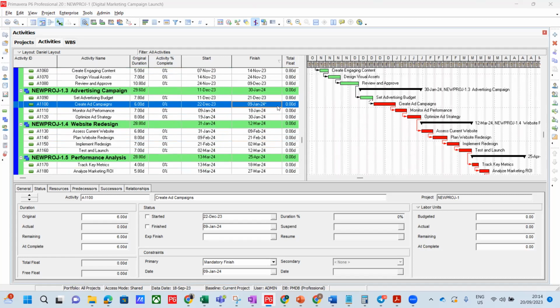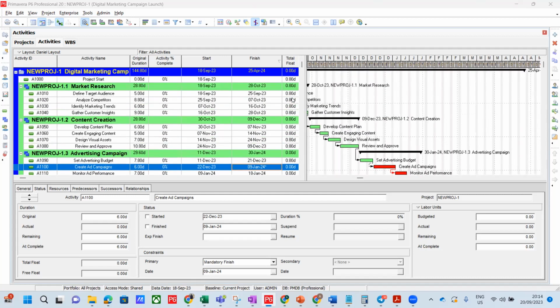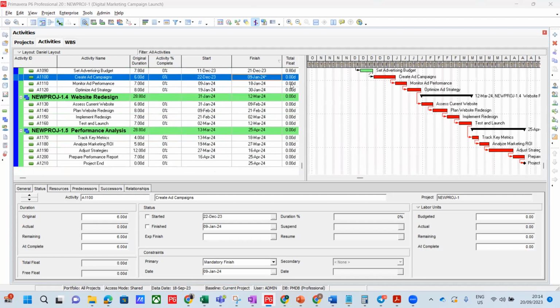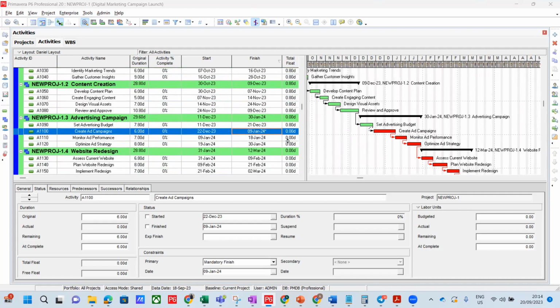It sort of affected the way my Gantt chart appears, and here you would see that there's a float, and then it stopped. Any activity before that date has a float of 0.80 days. But after that, there's no float allowance again.